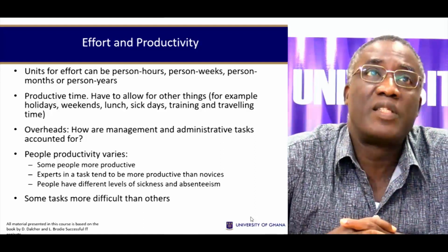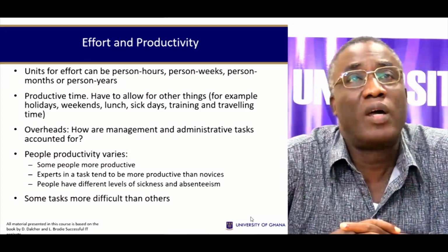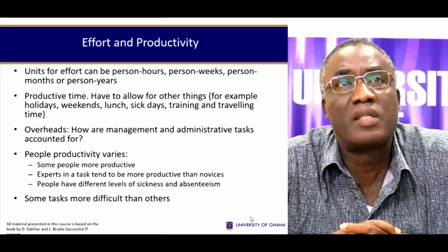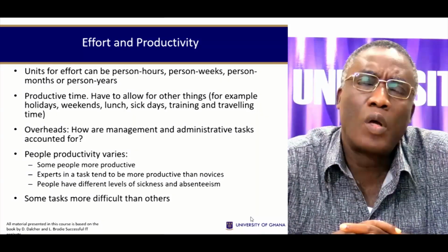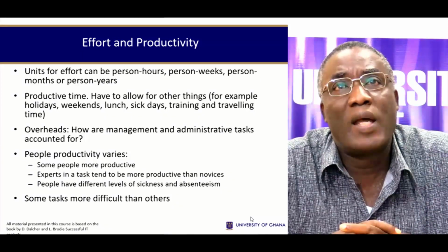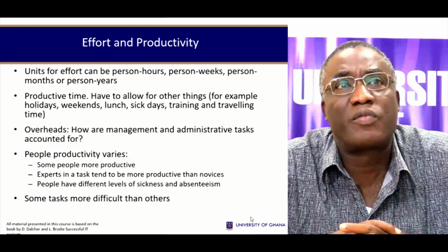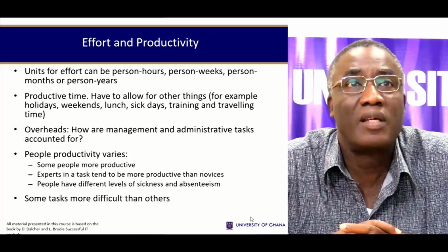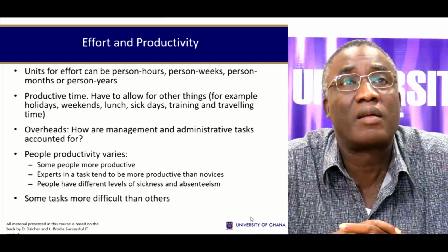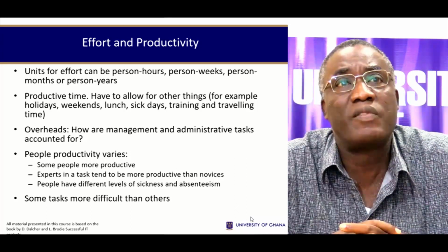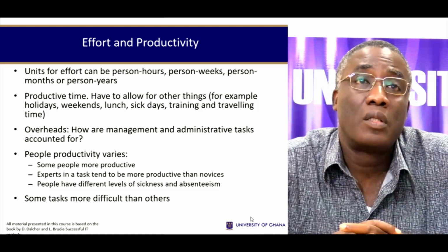Effort and productivity. The units for effort can be measured in person hours, person weeks, person months, or person years. What does this mean? Productive time. You have to allow for other things, for example, holidays, weekends, lunch, sick days, training, traveling time, etc. Overheads. How are management and administrative tasks accounted for?